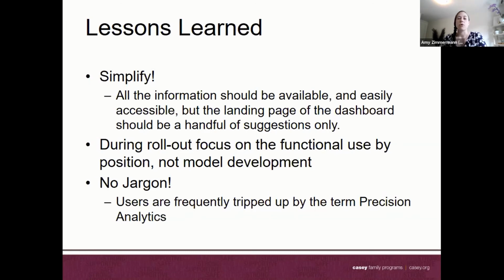Also, during rollout, focusing on the functional use of the dashboard by position would be much more beneficial instead of starting with how the model was developed and what precision analytics is all about, because I think that really tuned people out. It's just kind of not part of their world. And so they didn't see where they fit into the conversation when we front loaded the demonstration in that way.